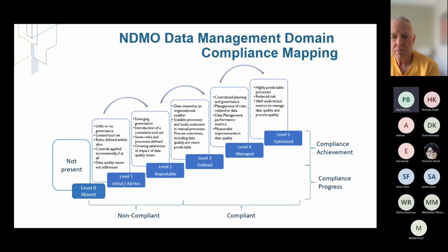So here is an example of progressing maturity assessment. We did, that's 5 of them over time. And we used it powerfully, I believe quite powerfully, to show progress in the project, how we were progressing apart from the burn down that we constantly were watching, and we used those in our presentations back to the Steerco project office, etc., to show the progression.